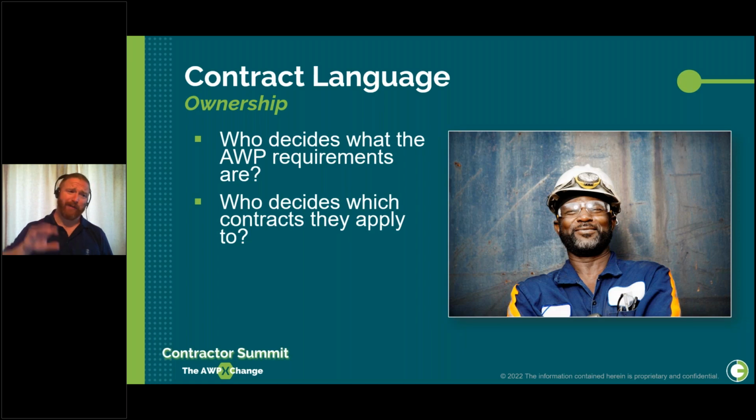Whereas if you've got a contractor who's off working in an area all on their own, their timing, their schedule, their cost, their delivery isn't going to impact the rest of the project, that might play into that conversation as to whether you're going to need them to be part of that AWP methodology, especially if they're not used to doing it. So as with a lot of things, there is no hard and fast answer, especially to the second question. Some contractors, for example, will start with a narrow approach, so just pipe and steel. Then they start to expand it as their familiarity with the process improves.